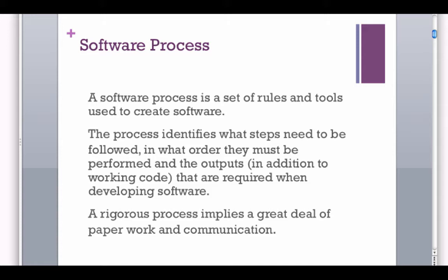And we were also very poor at estimating how long it would take to complete something, because very rarely did we actually get to do anything from start to finish without putting out some fire. Having a process in place, though, is absolutely essential. The software written in that first group wasn't even in the same league as the software written in the second. And I think I mentioned last time, I don't remember ever working more than 40 hours a week in that second group.